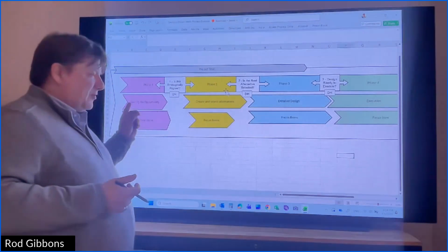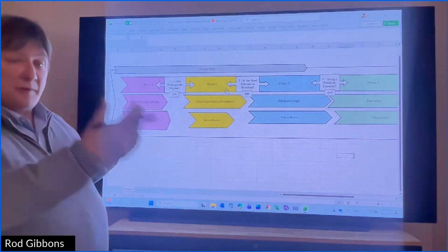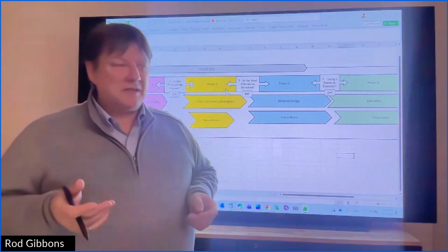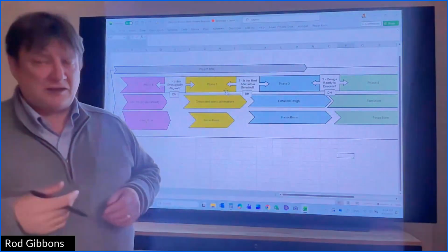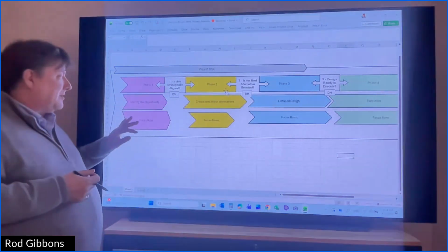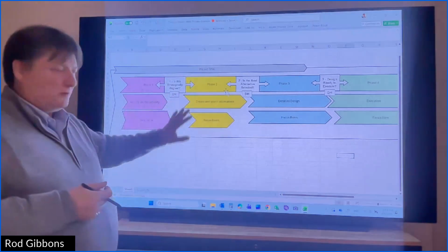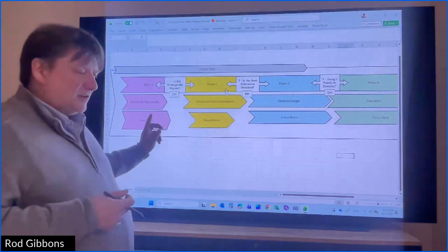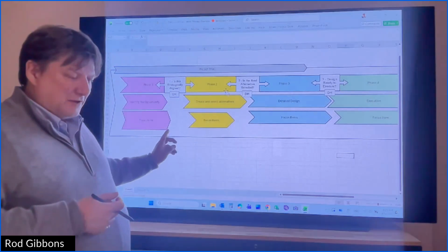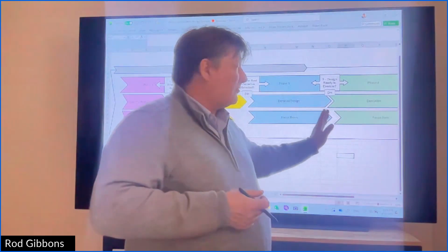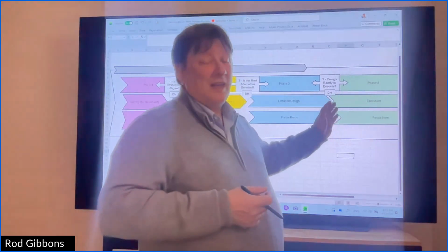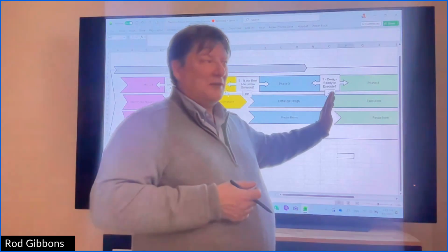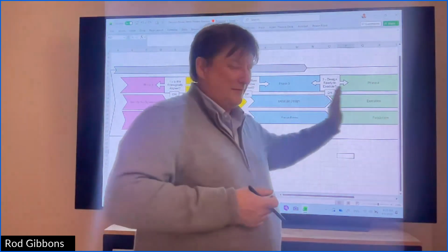The thing that can speed up a project or add value to a project, and this has been proven in multiple studies on project management and on job execution, is spending more time getting this part right, phases 1 and 2. It saves time down here, because something that's a small question here, easy to answer, by the time it's down here, there are already commitments made to a certain path. And sometimes, when it's based on assumptions because that question wasn't asked, it is costly and time-consuming to make a change the further down this line you get.